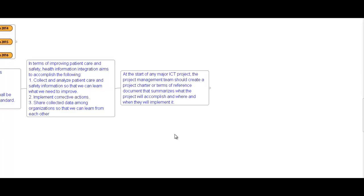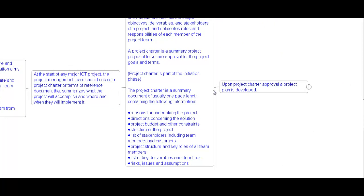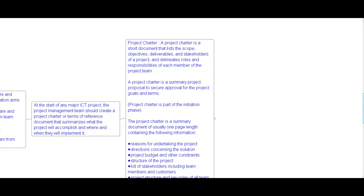Remember: at the start of any major IT project, the project management team should create a project charter — a terms-of-reference document that summarizes what the project will accomplish and where it will be implemented. A project charter is a short document that lists the scope, objectives, deliverables, and stakeholders of the project and delineates the roles and responsibilities of each member. It is a summary project proposal to secure approval for the project goals and terms.